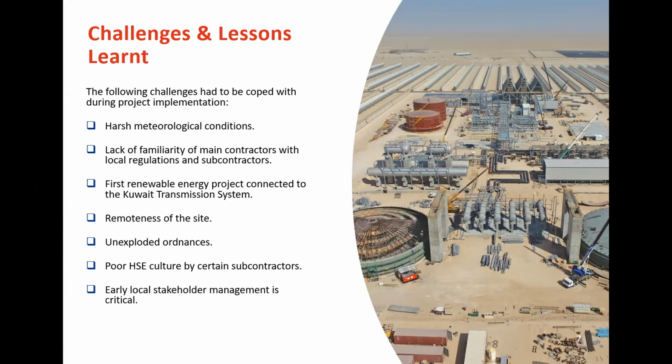Okay. The last one I've included here is on the early local stakeholder management, which we consider is critical. I've already touched on it briefly in the previous items. On one side, to obtain all the approvals by the local authorities, MEW and NCC, the municipality, the fire department.